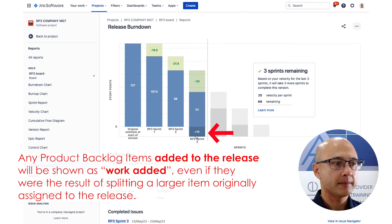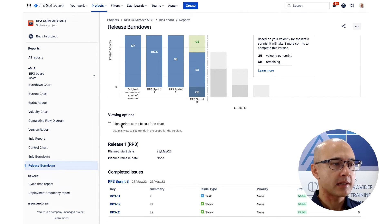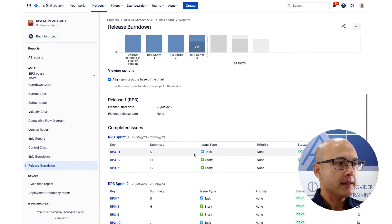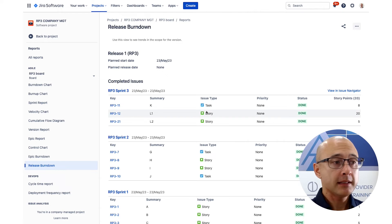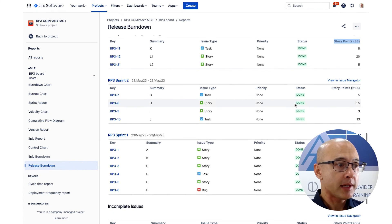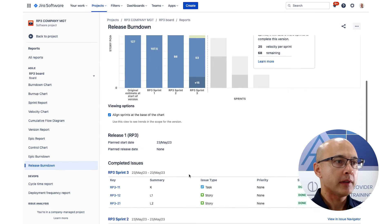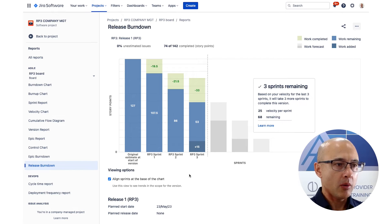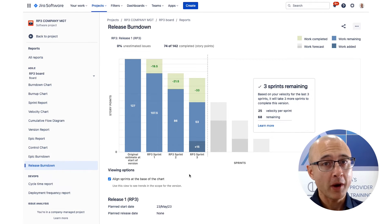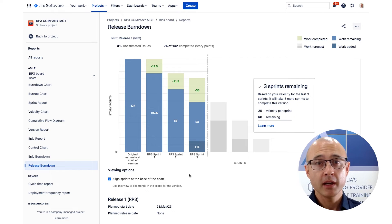At the base of the chart you can toggle a line sprints view, and underneath you'll see details about what work was completed and when — all the product backlog items, how many points were completed in each sprint — and if you scroll to the bottom you can see all issues that still remain. The release burndown is a really great way to see what's going on with your release, how much work is getting done per sprint, how much is being added, and an indication of when the release will be done.